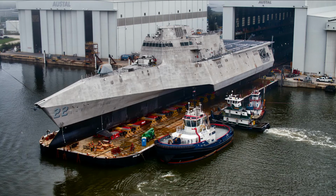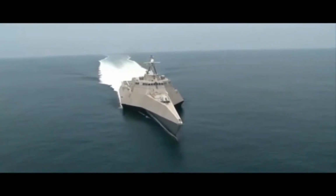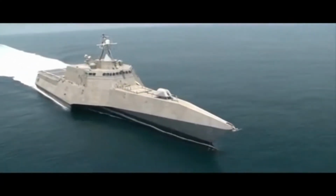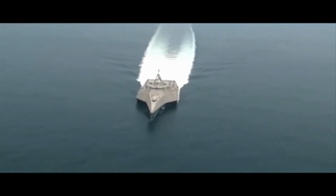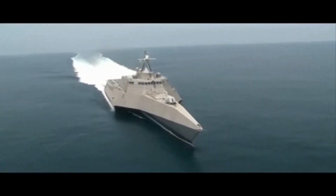The development and construction of Independence as of June 2009 was running at more than 3 times budget. The total projected cost for the ship is $704 million. The Navy had originally projected the cost at $220 million. Independence began builders' trials in July 2009, 3 days behind schedule because of maintenance issues.